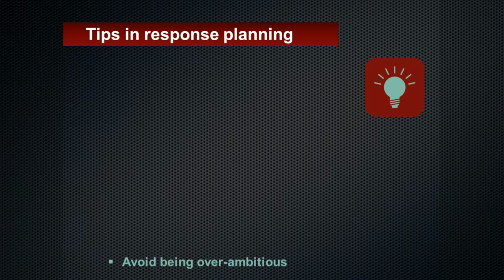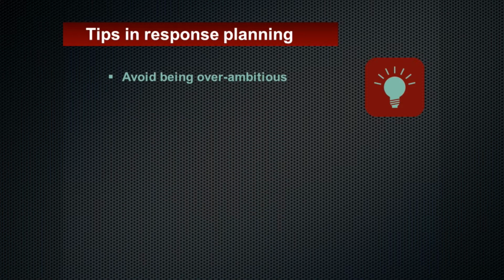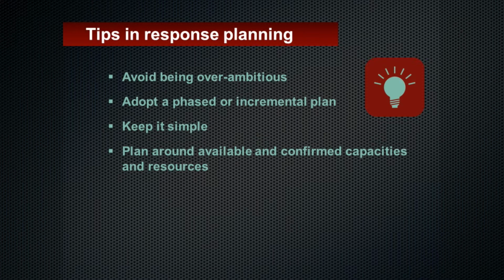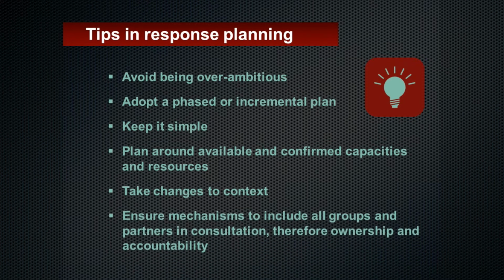Avoid being overambitious. It's easier to scale up activities over time. Adopt a phased or incremental plan in the immediate response. Keep it simple. Keep priorities and objectives to a minimum. Plan around available and confirmed capacities and resources. Take changes to context and the longer-term perspective into account. Ensure mechanisms to include all groups and partners in consultation, therefore ownership and accountability.